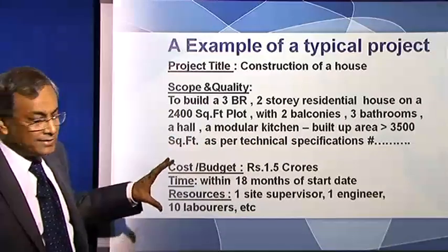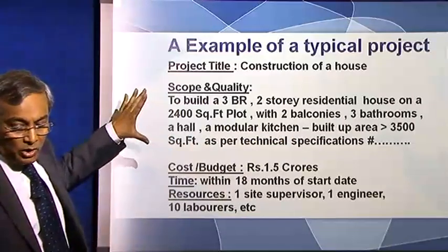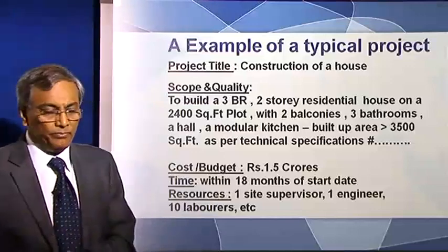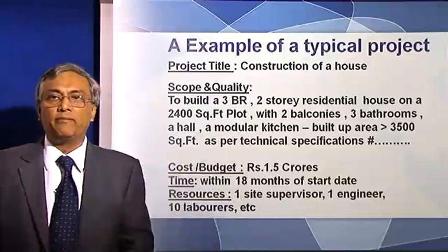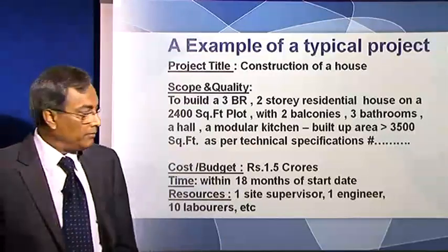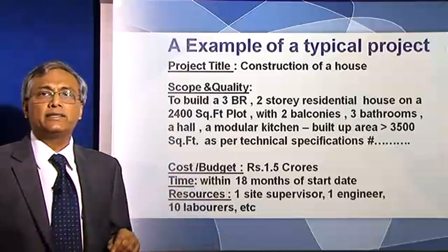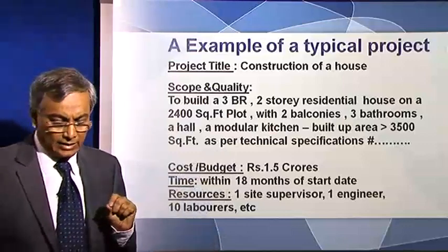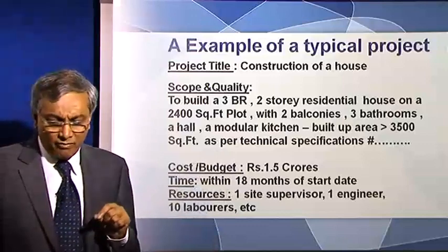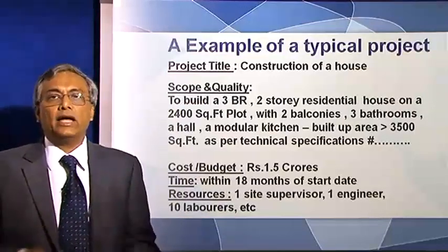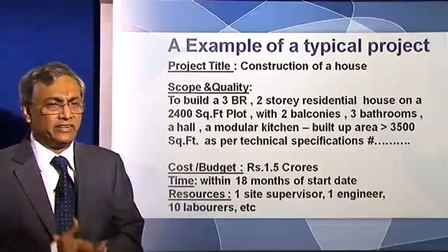So as a project manager, this is the scope that you have been given by your client. The client has also told you that the budget should not exceed 1.5 crores. The client wants this project to be completed in 18 months from the start date. And what are the resources that you have? You have 1 site supervisor, 1 engineer, 10 laborers, etc.